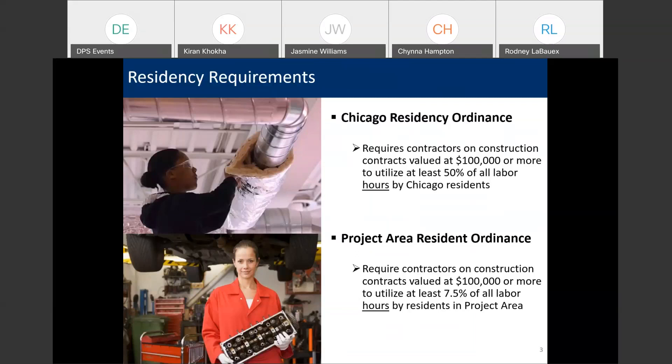When you get a bid package, they'll either have a physical map showing the boundaries of the project area or a written description of the street limits for the particular project area. One thing to keep in mind is that if a city resident also happens to be a project area resident, that counts towards both the 7.5% requirement as well as the 50% requirement. Contractors must submit residency records and payrolls throughout the contract term so we can verify compliance, and penalties for non-compliance include liquidated damages. So it's important that you're aware of these requirements when bidding on a city-funded construction contract.